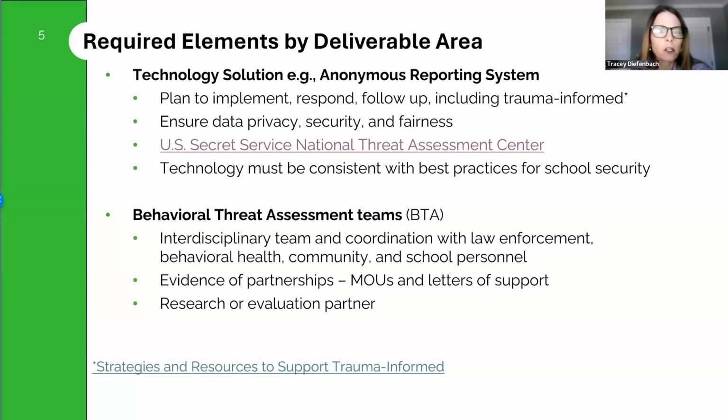All of this work in the research must be described in your program design section and included in your timeline and potentially reflected in your budget if that is appropriate for your project. So for example, your timeline should include key activities for an evaluator, such as securing a contract during the planning phase with the evaluator, the plans for collecting the above data, reporting and reviewing this data.